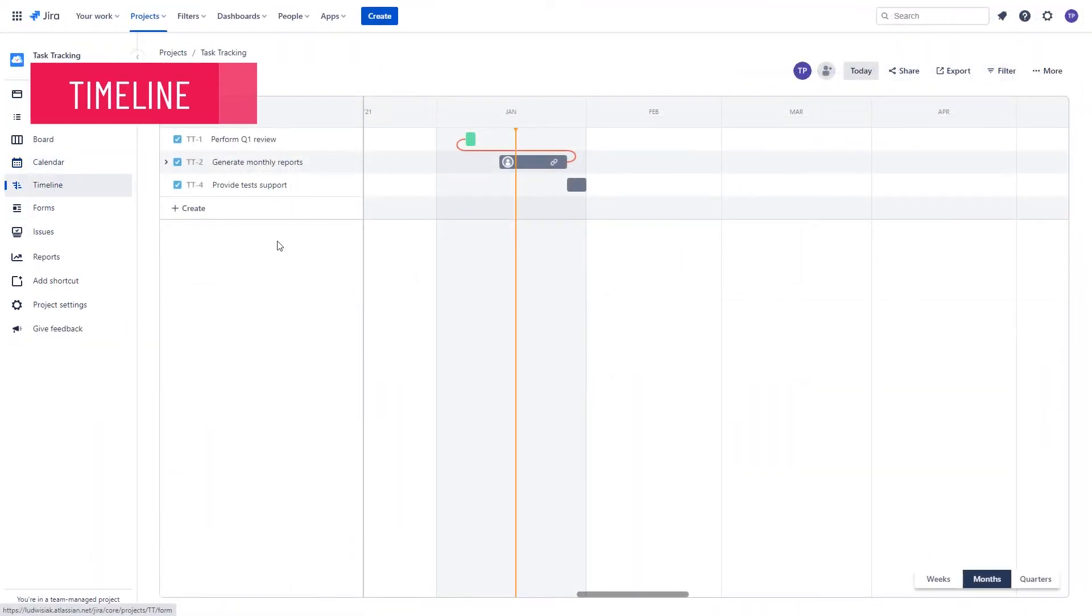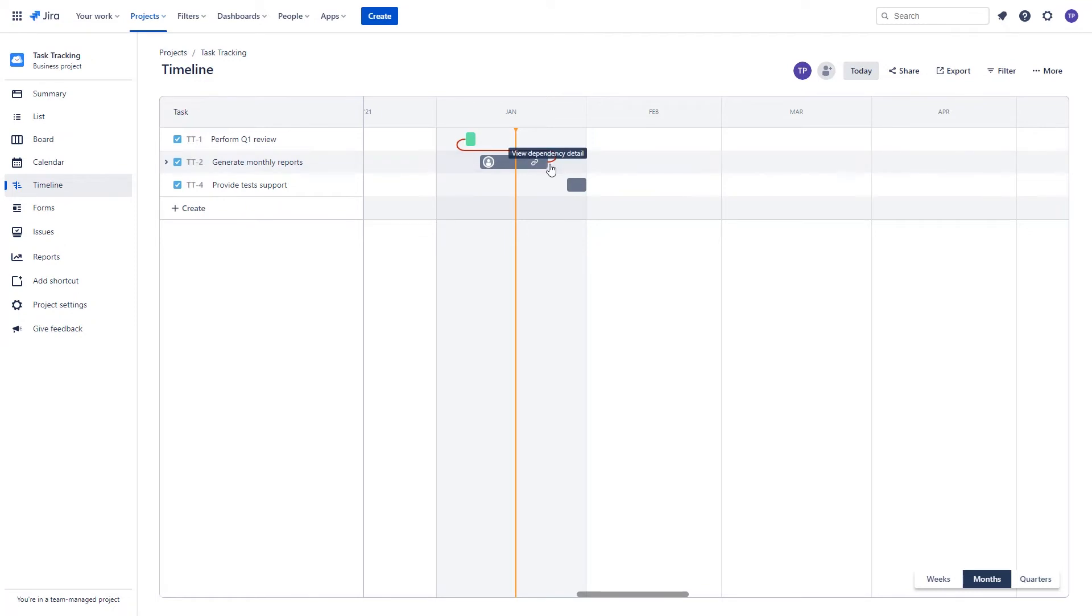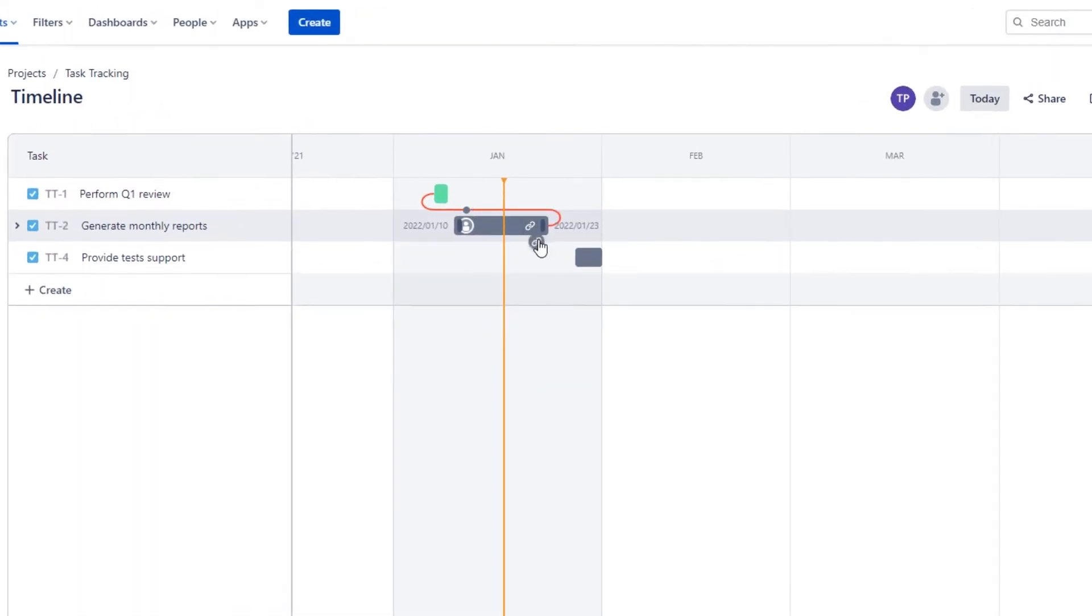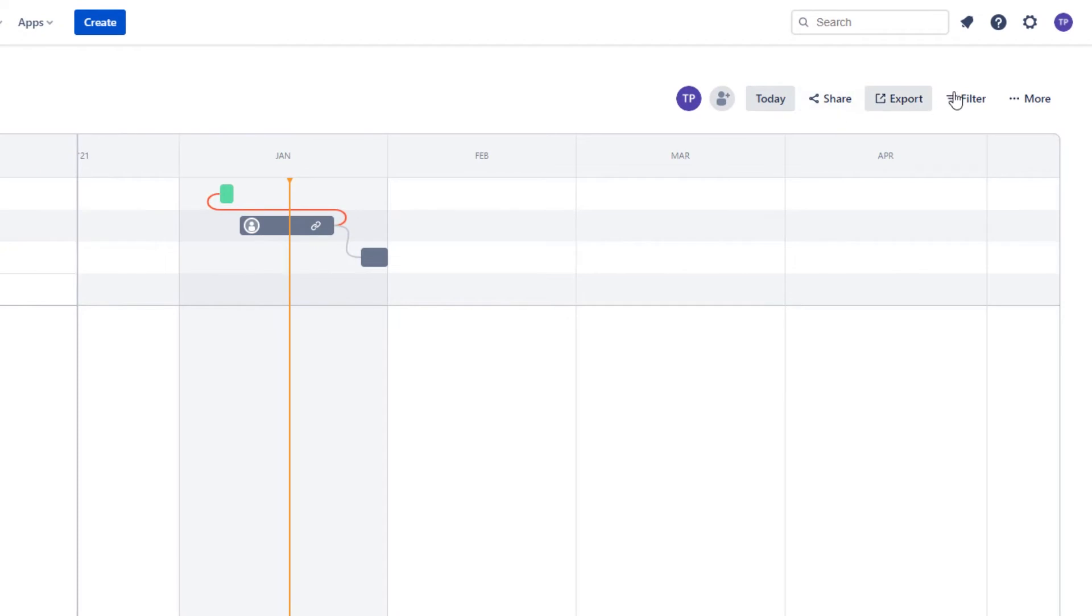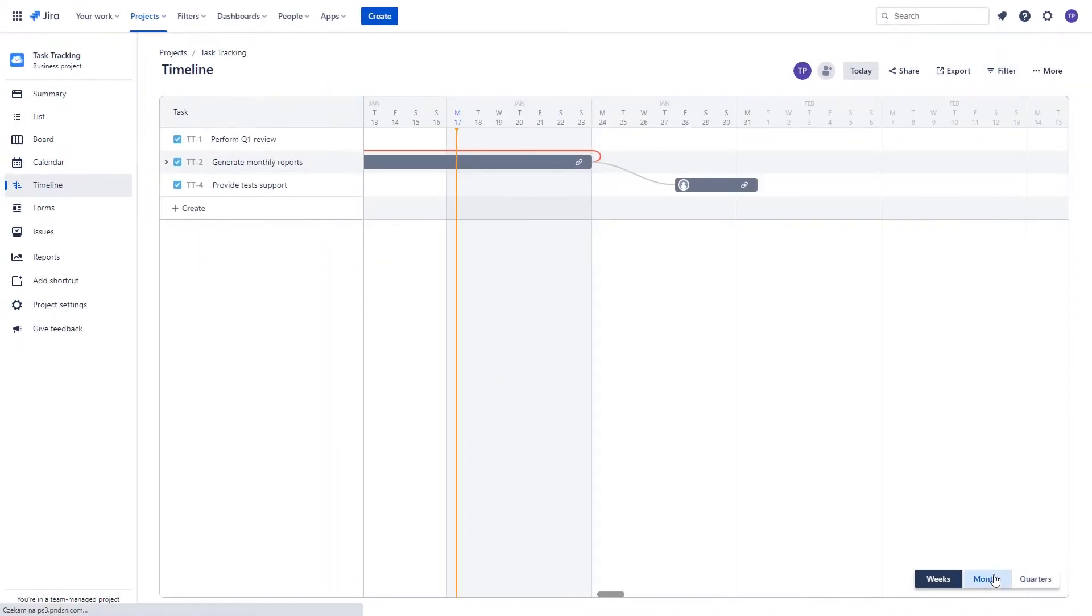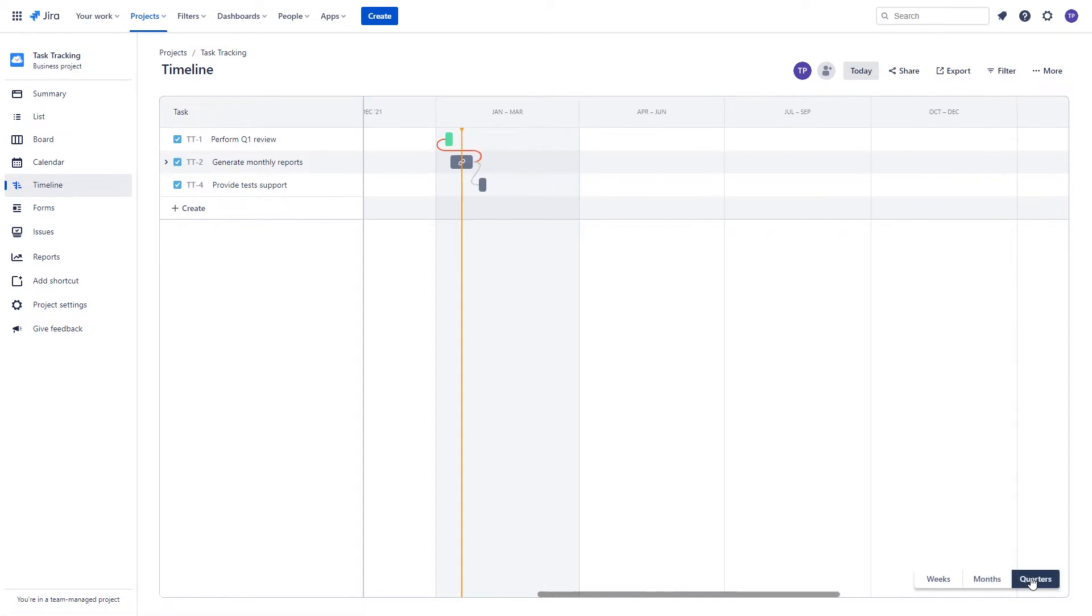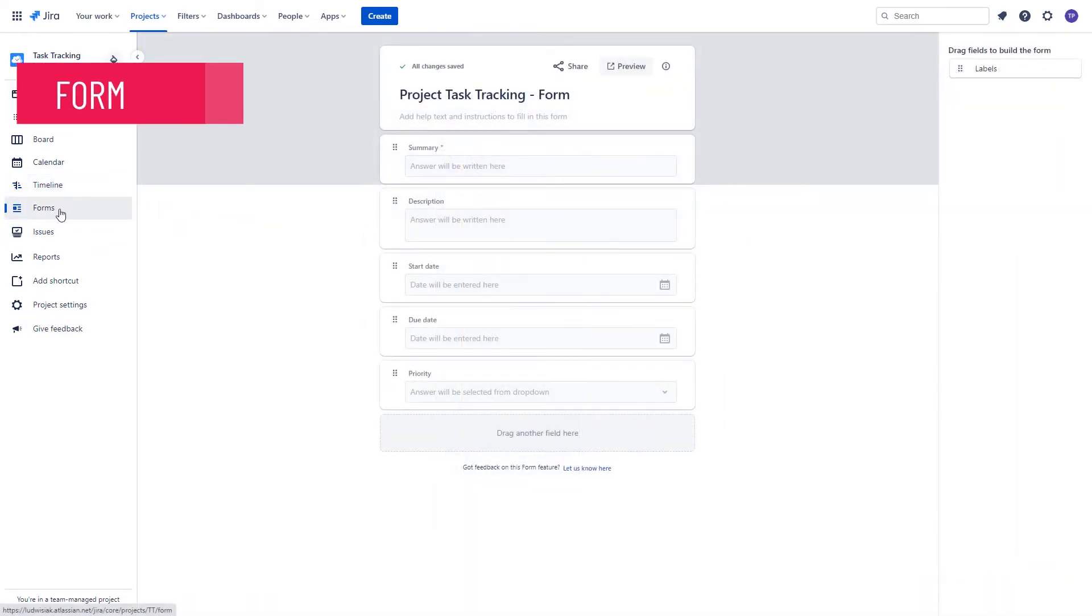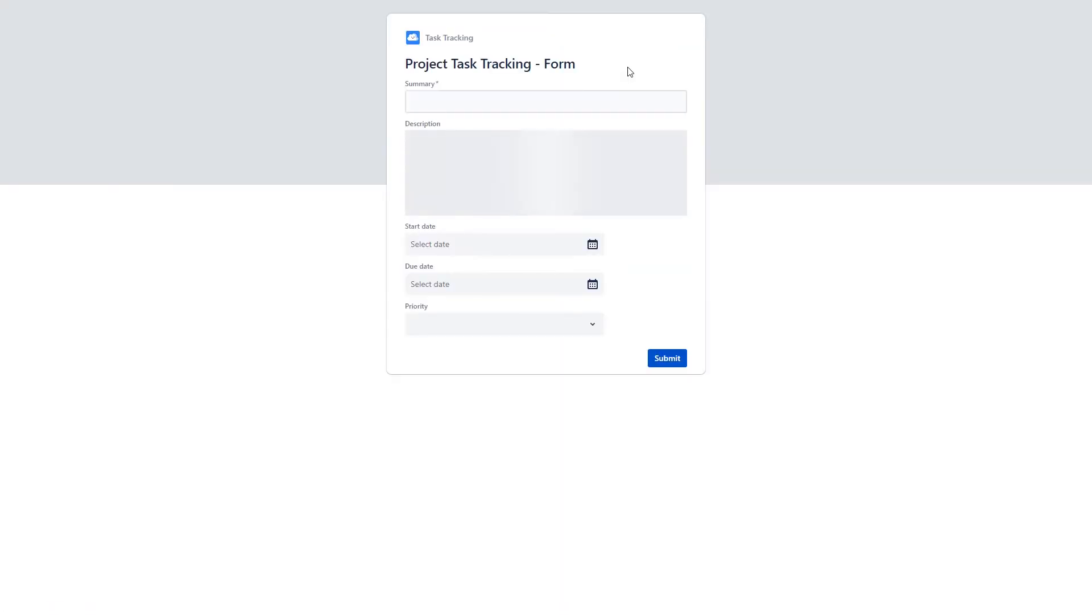The timeline feature will allow you to have a Gantt-like view at all the elements described with the start date and due date fields, giving you the possibility of creating dependencies between those elements, filtering them and also viewing the timeline at different time perspectives like weeks, months or quarters. The forms feature allows you to design, preview and share the create issue forms that can be used for example for interdepartmental cooperation or just for simplicity.